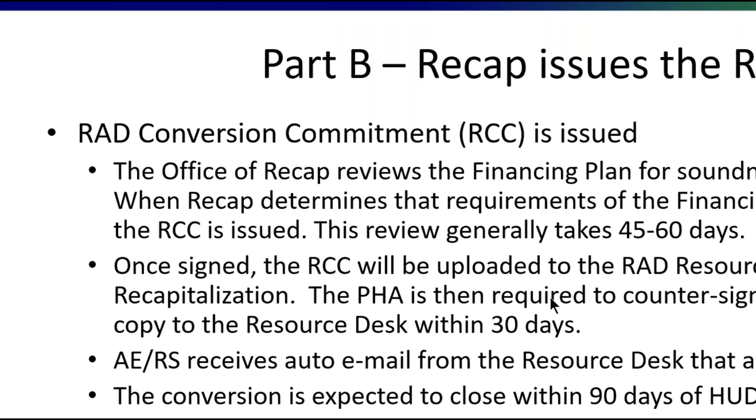On a recap side, we issue the RCC after we've reviewed and approved the financing plan. Once we have issued the RCC, we send it to the housing authority and the new owner. There are three signatures on it: HUD, the housing authority, and the new owner. Countersigning generally happens within 30 days, and then that gets uploaded to the RAD resource desk.